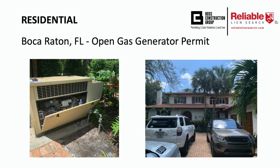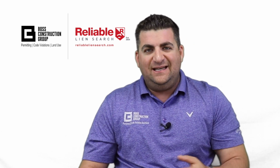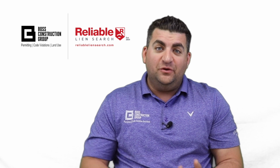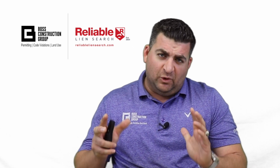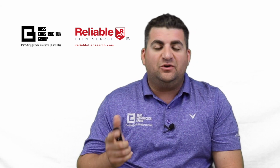This is in Old Floresta in Boca Raton, City of Boca Raton proper. This is a gas generator which converts propane gas into electricity and brings it into the house. Why I bring this up to you is because this is a beautiful home, and it's an excellent example of a plumbing and electrical violation that was also about 12 years old. In this particular violation, the city had done rough inspections for plumbing, but no electrical inspections, and no structural or landscaping inspections. So we had to make sure all of the components were working correctly, satisfy the fire marshal's office, and also satisfy electrical and plumbing requirements.